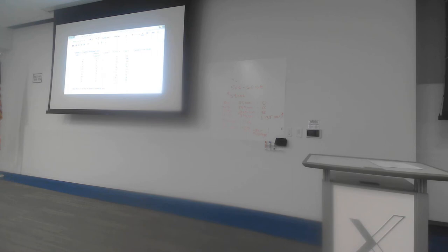The next two columns over are the normal cost and the crash cost. The symbol here is just a euro symbol. You could alternatively just put in the dollar symbol if you wanted to. The normal cost is based on the normal duration, what I had initially estimated would be the actual cost of completing that task, based on whatever different personnel or machinery or resources I'd have put towards completing that task. So we can see here in activity A, the normal cost will be 5 euro. Now, we know that we can possibly crash it down to 1 day if we need to. The cost of completing that task in 1 day is different and probably more expensive than it would have been if I had just done it in the normal duration. And so the estimated cost of completing that task in 1 day is 15 euro. And again, I've got the normal versus crash cost of all the different activities, estimated by me, the project manager, here.